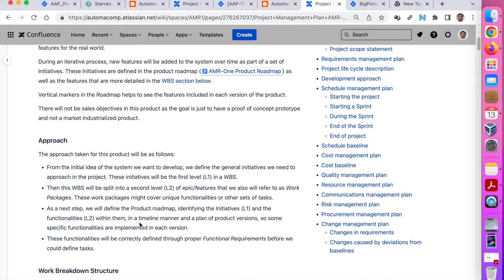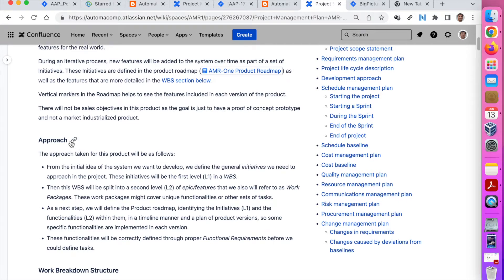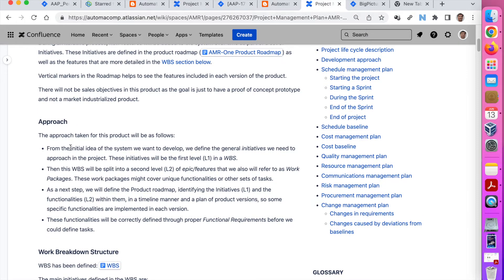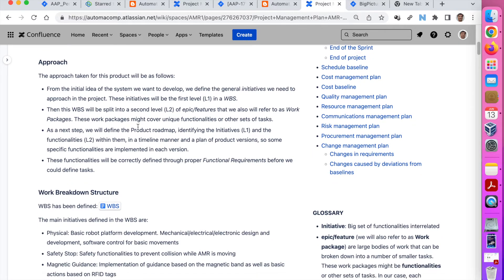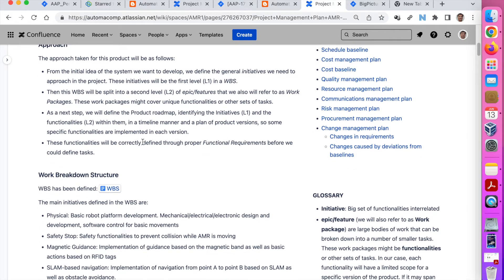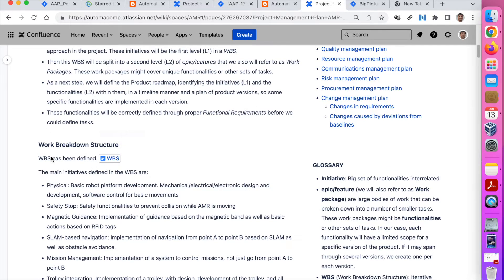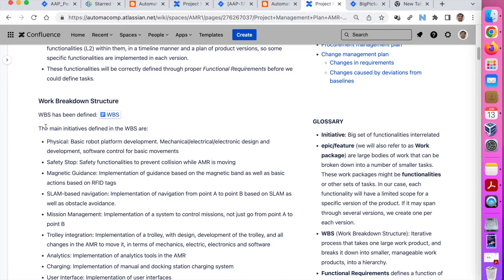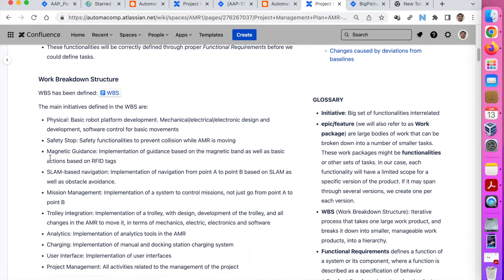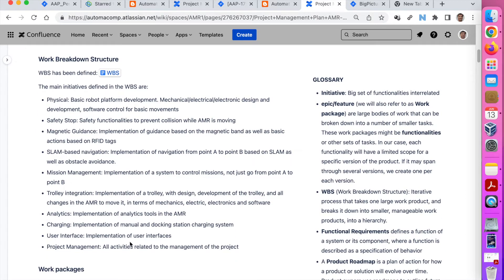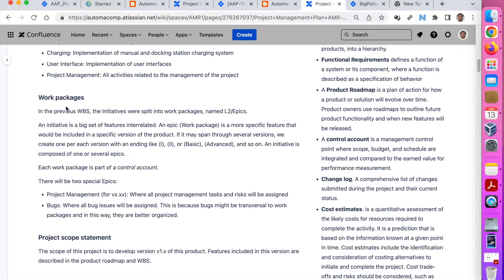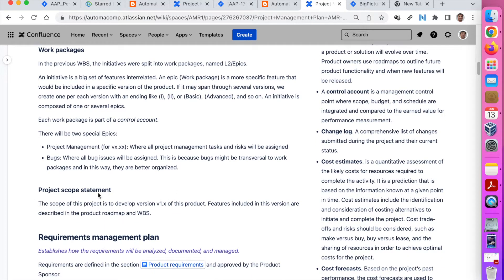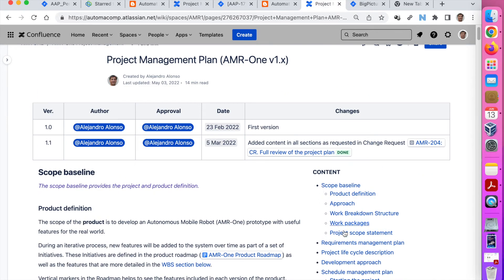The approach defines how you are going to apply that. In my case, I explained that I will use a work breakdown structure with level 1 and level 2 initiatives, as I explained in the previous video about functional requirements. About the work breakdown structure, I define what will be the different initiatives and features, and the work packages — how I am going to manage the work packages and the project scope statement. All this part includes the scope baseline.